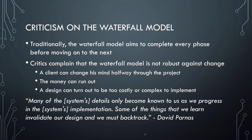One of the main problems with the waterfall model is that its steps are pretty rigid. Once a step is completed there's no way to go back. This means that the waterfall model can't handle change very well. Since software is pretty complex this is a big problem. Changes can occur because a client wants to do things differently during the project, the money can run out, or you realize too late that parts of the design were not technically feasible. Basically you're learning a lot while creating a software product and you need a process that allows you to incorporate what you learn into the product. In other words, you need to embrace change.